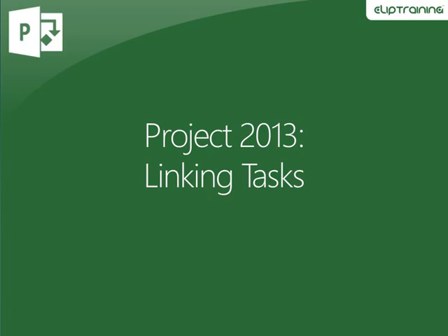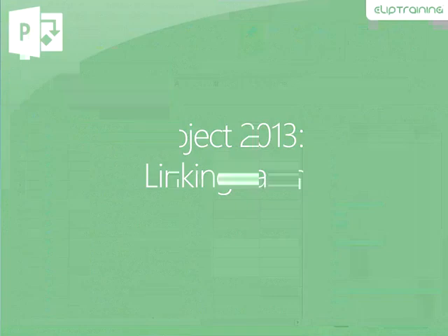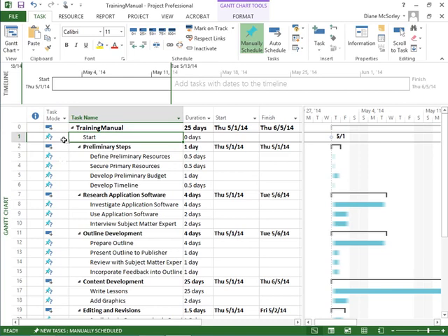Our next step now is to link the tasks together, to specify how they'll occur. Many times we have one task that needs to finish before the next task begins, and that's called a finish to start. One finishes, the next can start. But before we do that, I want to take a look at the task mode column because we see a couple of different indicators in here.